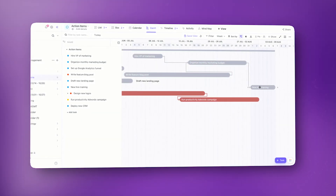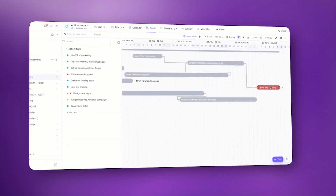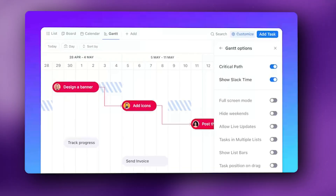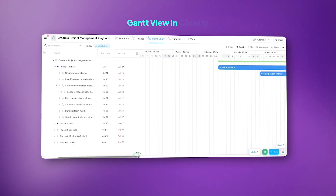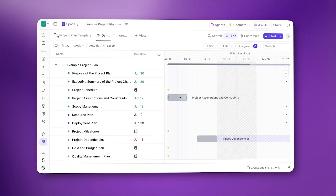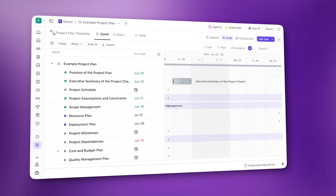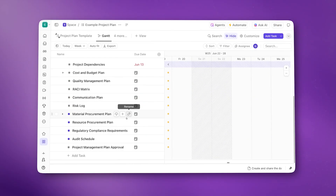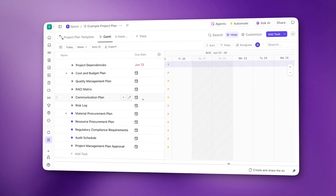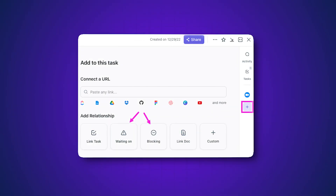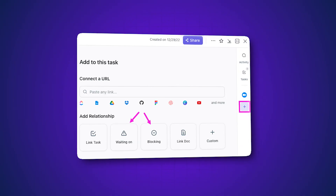You can use any project management tool for this, but if you want Gantt charts that auto-adapt to changing priorities, ClickUp is ideal. ClickUp's Gantt chart view shows you your tasks, timelines, and dependencies in one view. You can drag tasks and add dependencies to automatically reschedule starting points or due dates — it's a lot faster than typing in new information every time something changes. This one feature prevents the domino effect that destroys timelines: when task A gets delayed, you immediately see what else shifts.